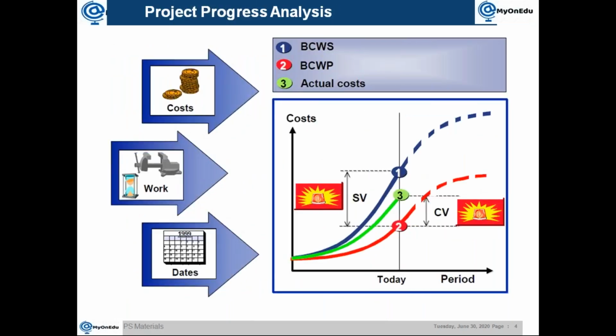So this is from an SAP perspective. If you look at this, this is what we are talking about. The same concept is there in others also. For example, we'll have a cost, work, dates, everything. These are the inputs, so accordingly you will get the time period. Then you will have a cost. Then in different periods you put the dots and join all of them, then you will get a curve. That is what we call the S curve.